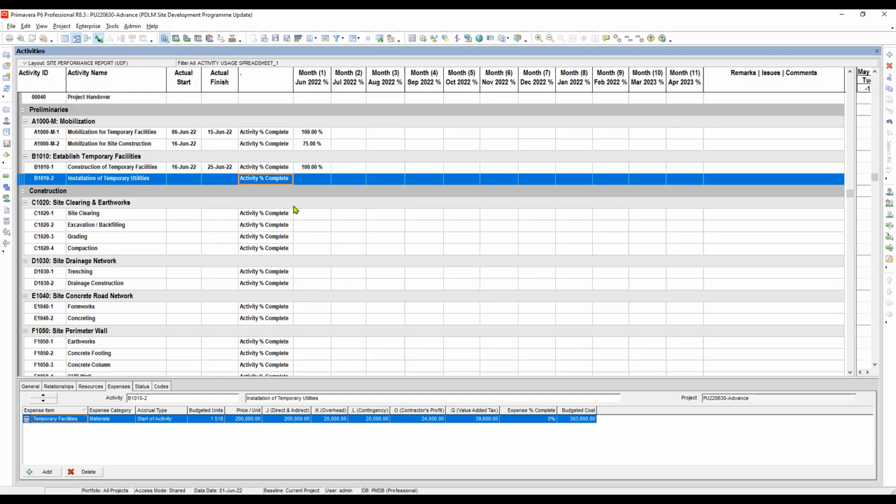Okay. This is one thing, guys. Let me apologize for the overlooked data, which should have been included in our early episode. Actually, this overlooked data has a significant role when updating project progress. The bill of quantities, or BOQ, is always the primary reference when developing a project program.